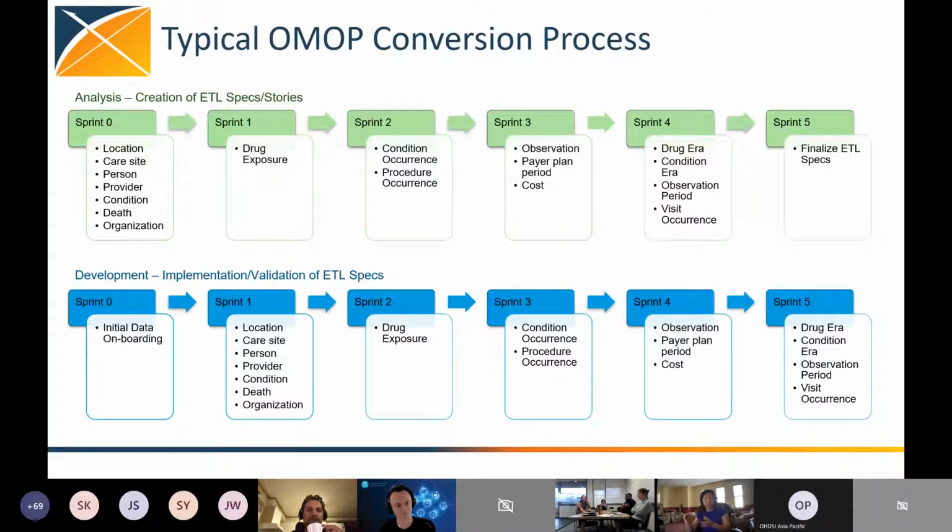Okay, in my group, we have learned to adapt it to meet our needs, right? And to make sure we get what we do. And we do have daily stand-up calls, and folks have gotten used to it. Some of their user stories, when we first started, we made them break it out into very small chunks, like at least a day, so that they get used to that thought process of breaking up their work.